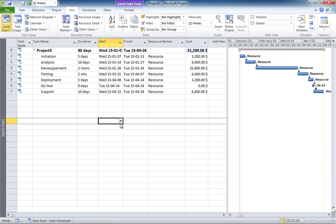Or the need for renting space at the lab at a fee, which starts from the moment you install your server in order to configure them, until you remove them after the go-live. You don't want to set specific dates for this, otherwise you will need to manually update these admin tasks every time you change your schedule.